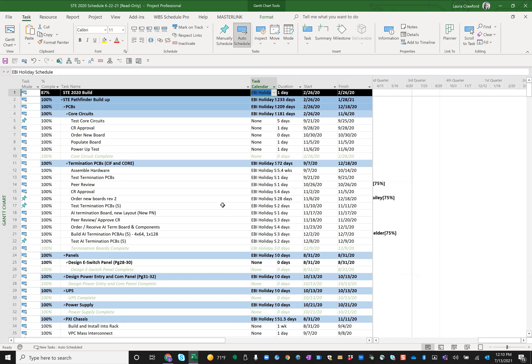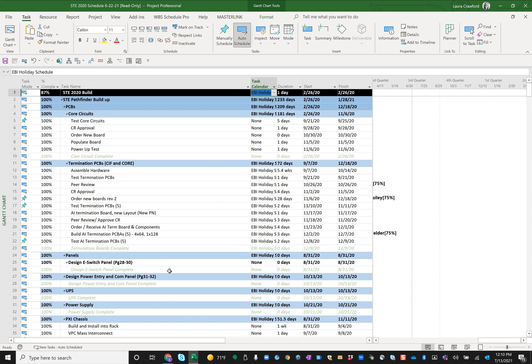There's also resources in this project plan, and those resources do have calendars assigned. So I'm thinking this must have been an inexperienced project manager that didn't realize that the resource calendar would suffice. There's really no reason to need to assign all these task calendars to all of these tasks in this project plan, especially when there's sometimes a task calendar at a summary level but not at the subtask level.